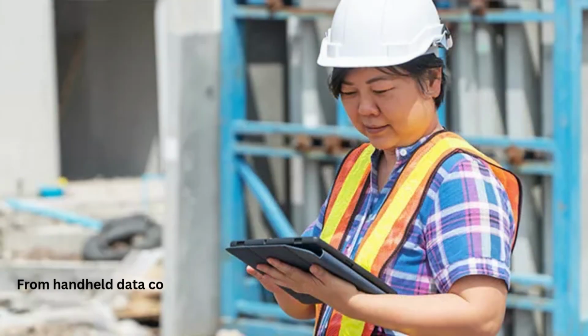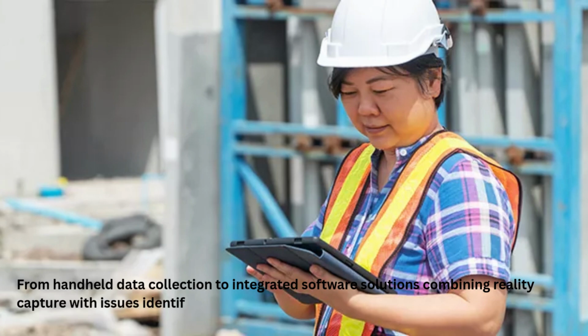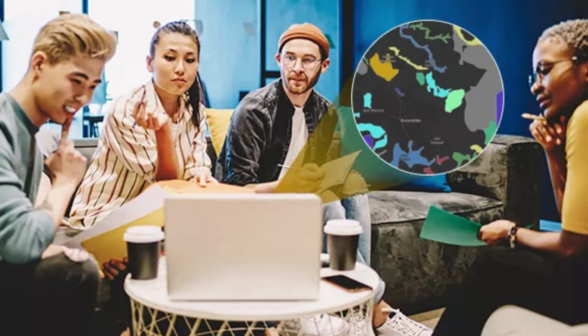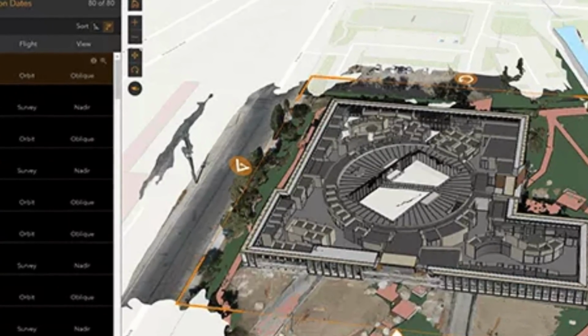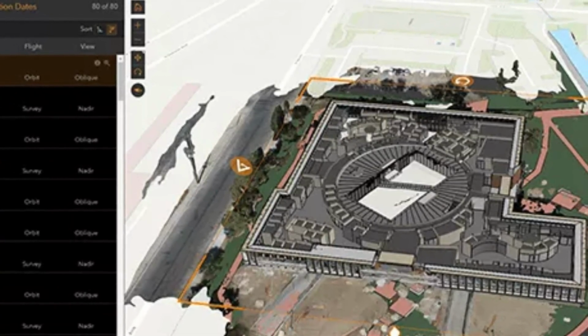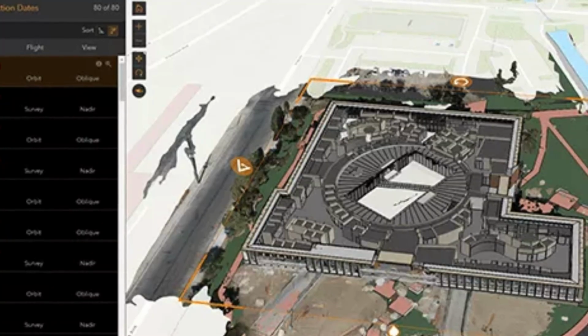3. Job site workflows. GIS modernizes job site workflows by connecting field teams and office teams in real time. Workers can collect progress photos, quality inspections, safety reports, utility locations, as-built conditions. All of these updates appear instantly on a project dashboard. Drone imagery, 3D reality capture, LiDAR scans, and GPS-enabled field apps all feed into a single GIS platform. This reduces errors, improves communication, and gives project managers a precise, up-to-date picture of the construction site.